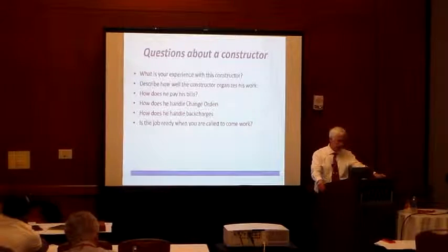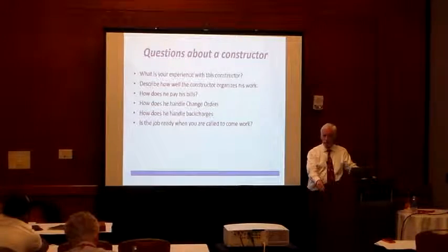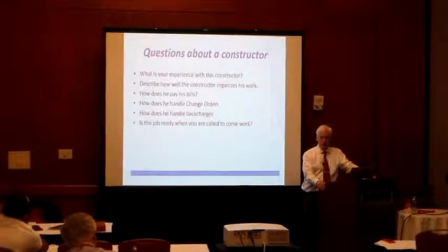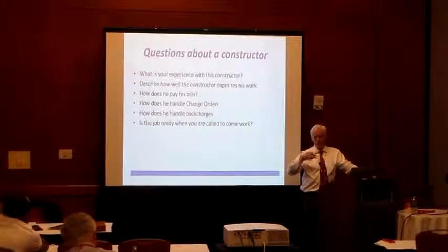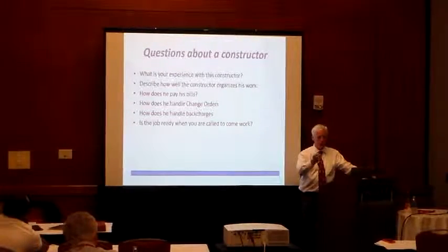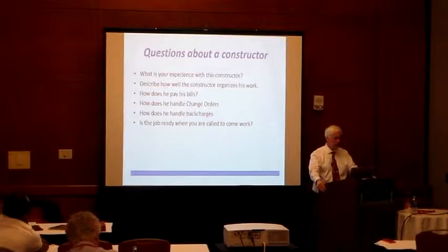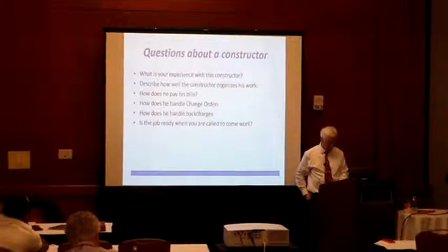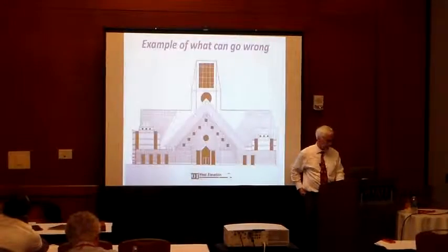You certainly want to know if contractors pay their bills. Again, if a contractor is a late-pay guy, then he's not going to get preferred pricing, and that lack of preferred pricing is going to reflect in his price to you. How a change order is handled, how a back charge is handled. And I covered, is the job ready when people are called to come to it.